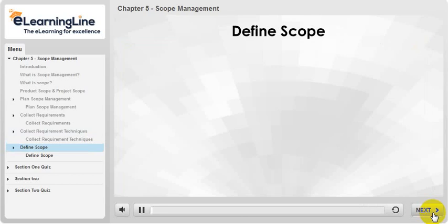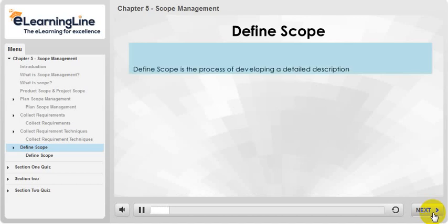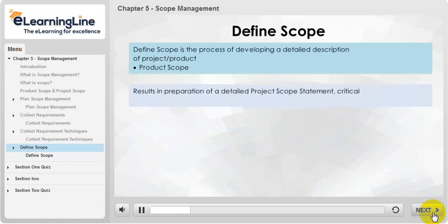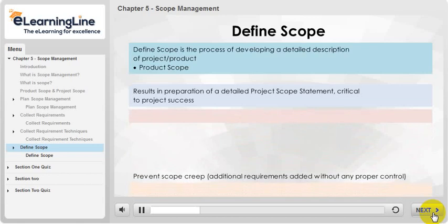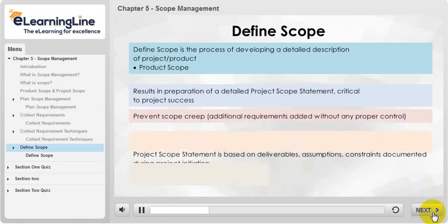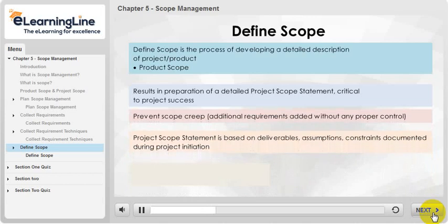As we already know, the define scope process deals with project and product scope, and outlines what will and what will not be included in the deliverables, including details of risks, constraints, and assumptions. Define scope provides alternatives if the budget and schedule could not meet management's expectations. Remember the term value engineering, that is a part of the product analysis technique to find alternatives to constraints to improve the product or reduce cost without sacrificing the scope. Can you guess the difference between define scope and project charter? Project charter includes high-level descriptions of projects.